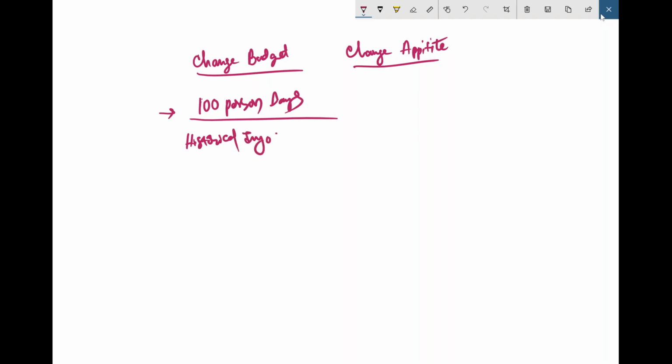let us assume there are some changes which are like 10%. So I'll say my change budget is 10%. That means I'll charge it beforehand, because anyway I'm going to get changes which are typically 10%. So upfront, I will add this into my budget. In terms of time, I'll say it will take 110 days, assuming that I'm already accounting for 10% changes. Otherwise, what will happen if I'm not accounting for it?